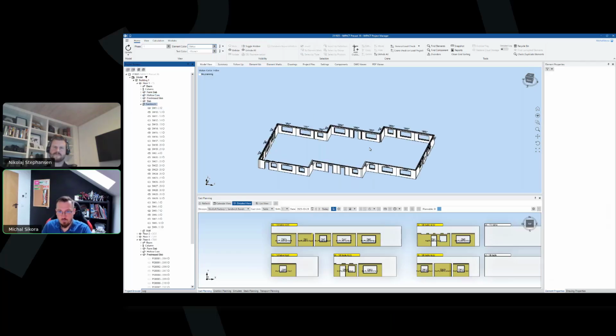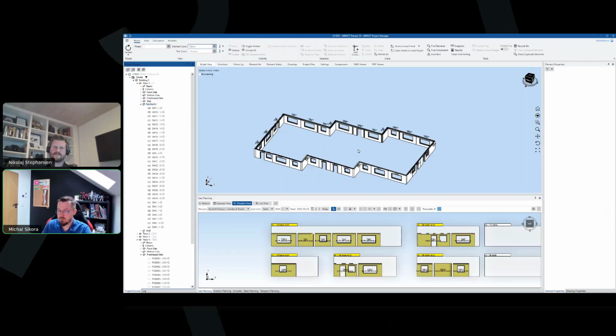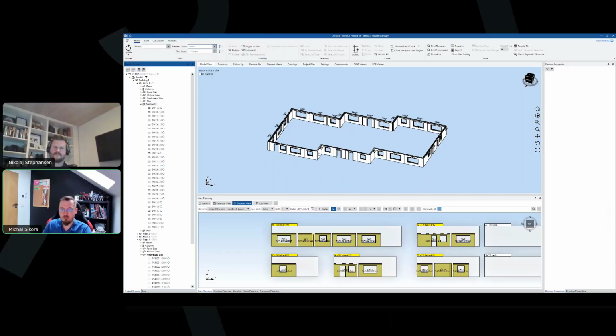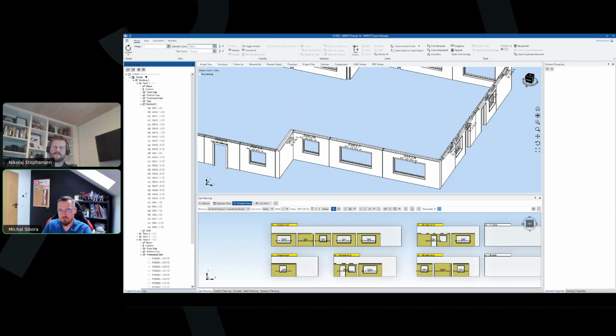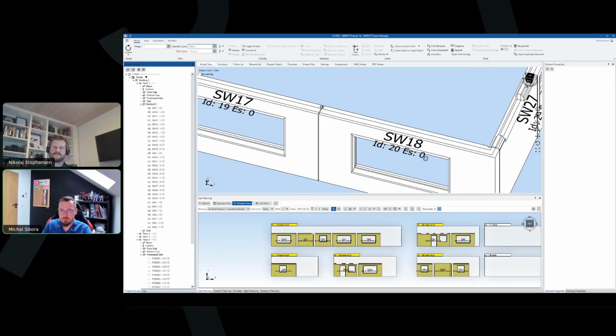Simply put. Let's go back to sandwich panels now. Of course, we've added the crane. We want to start. Maybe we know when we want to have those elements built on site. But first, since we know where to put the cranes, we also control the erection sequence of the elements. So with that, it's a good idea to actually assign which element is built in which order, or erected in which order. I'll zoom into the element mark here, element ID as well.